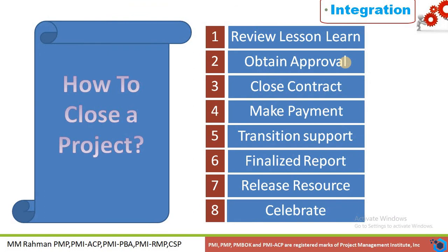Then, in short, we can say how we will close the project. First, review the lessons learned. Then obtain the approval. Then close the contract, make payment, transition the support, finalize the report, release the resources. Then we will celebrate our success.